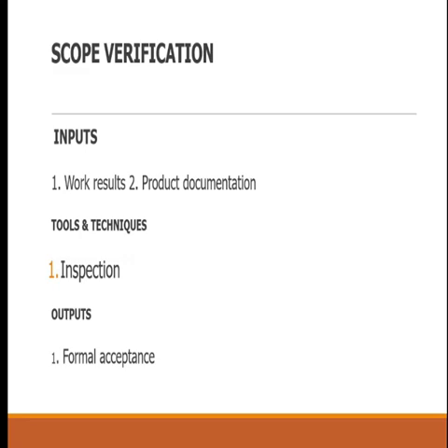How do you verify? You need to inspect. You can't be in the office to verify what ought to be physically verified. You need to be physically present to physically inspect what ought to be inspected. All right? So inspection is important. It can be a walkthrough inspection. It can be a benchmark. However, you must make sure that the results are in line with the original plan and scope or expected design of the stakeholders or the consumer or the client or the customer.